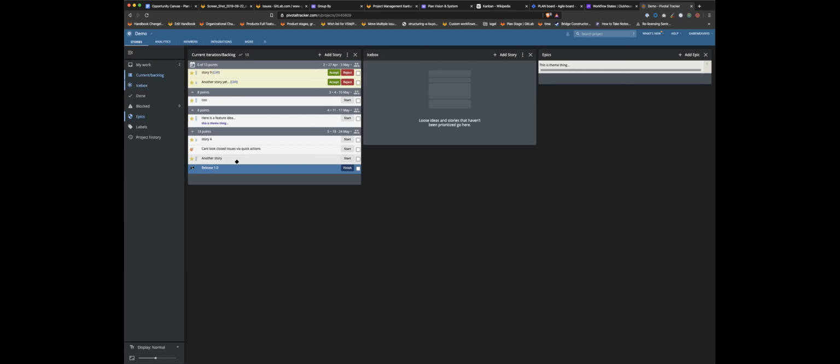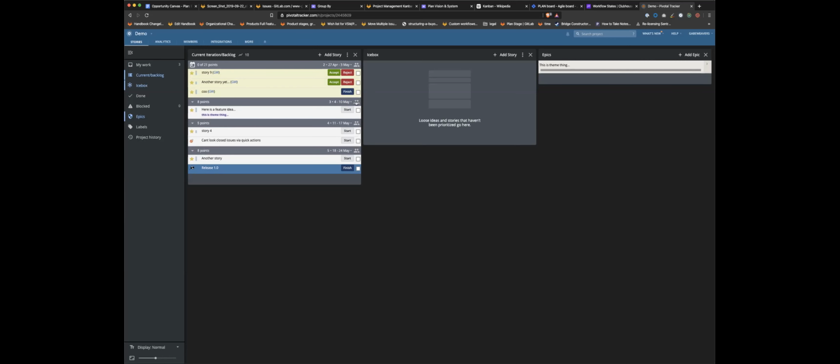And then the last 2 questions, actually, the accept and reject, is that the work has been done and you're signing off on it, or that you're approving or rejecting the proposal? The finished work. Usually the way the workflow would go is an engineer would click start, or they would use a commit hook or something like that from a branch in GitHub or GitLab or whatever. And it would basically say, I'm going to start this issue, which would transition the state. When they get their issue up for review, they would click finish or ready for review. And then more or less, this would be saying it's in review right now because it hasn't been delivered.